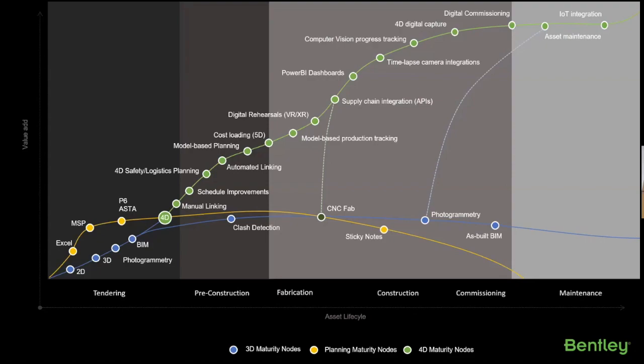So I've got an example of a GC who's now connected with their curtain wall supplier, and that back of house supply chain system, which is tracking the fabrication, the prefab elements, is sending signals every 24 hours into Synchro. So the status of every curtain panel is basically known now. So I think that's really interesting.